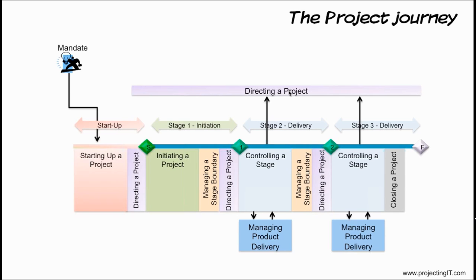Lessons learned are also described using the lessons report. The team performance and the supplier performance are also assessed. The project manager creates the end project report to describe the evaluation of the project. The evaluation is done against the baseline BID, that is the original one created during initiation. The reasons for deviation are analyzed and lessons are learned and suggested to improve the method in future projects.